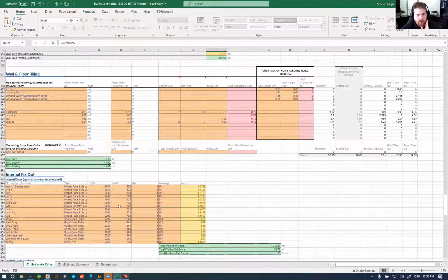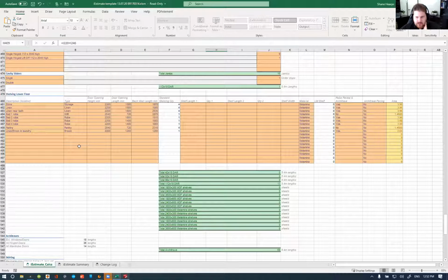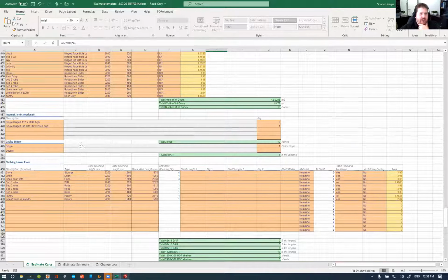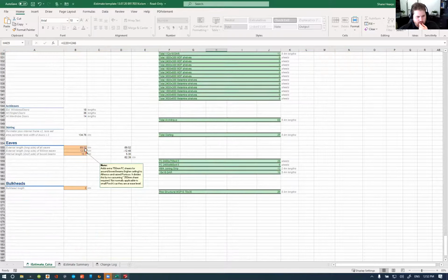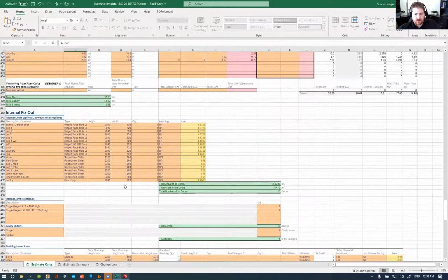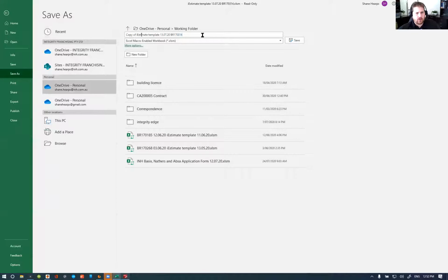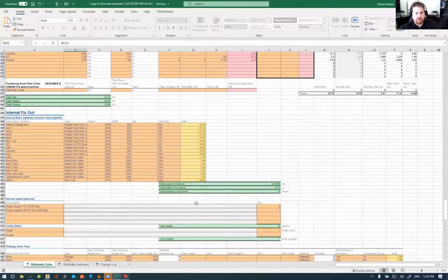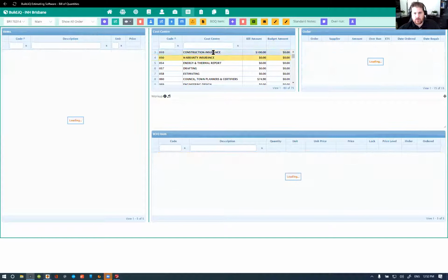All right, tiling I'll check in a moment. That's a lot of doors. And by the looks of it, there's potentially been double data entry here. We don't need to enter the Roebel-Linn doors in both locations. Otherwise, we do inadvertently end up with double deductions. But none of this stuff here is going to affect me just pumping through the BOQ for the moment. So I'll save this. And then have a look at these total figures versus what's currently been exploded.